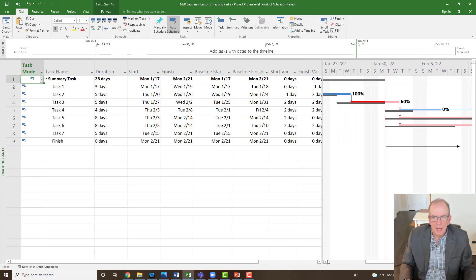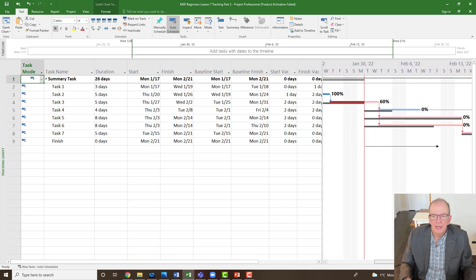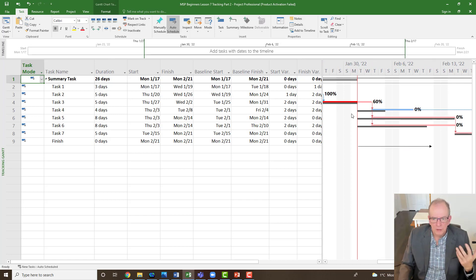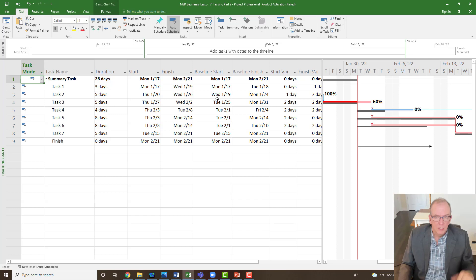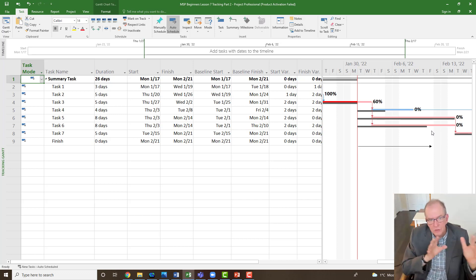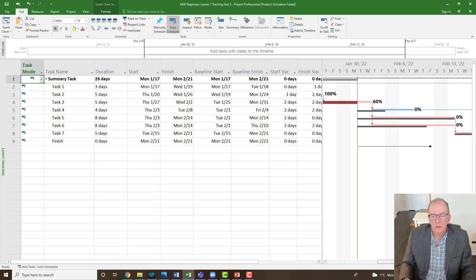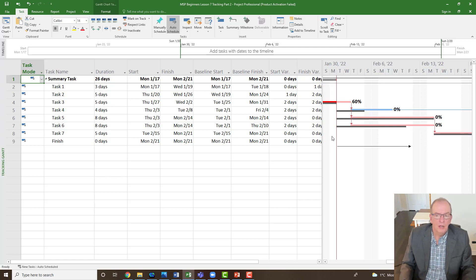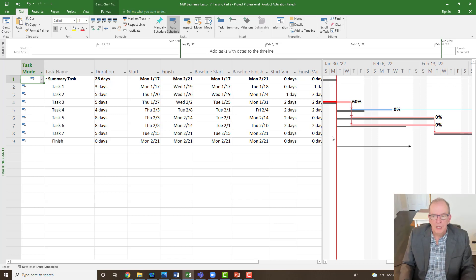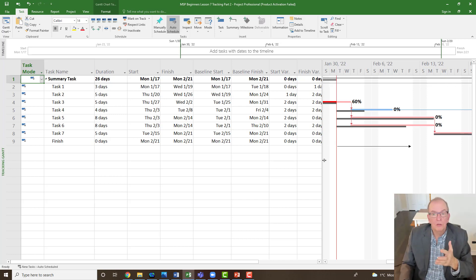The overall project variable costs — the PM and site super — are also less because they're there for less time, so now we have no variance. If I go to my tracking Gantt, everything should be in alignment, and the variance screen will show zero start variance and zero finish variance. We've adjusted this to get it back on track using the direct method: detect along the critical path, look sooner rather than later to fix it, and try for the no-cost or low-cost solution. We would save this file using the file naming protocols as the recovery file.